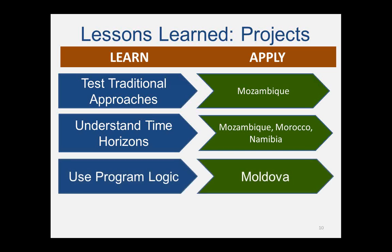Lesson number three: use the program logic. The case of Armenia showed us the importance of always going back to the program logic during implementation, especially in integrated projects that pair training with irrigation or rural roads. In Armenia, the irrigation infrastructure was delayed, but farmer training went ahead on schedule. This created a big gap right in the middle of the program logic — trained farmers didn't have reliable access to water, which was one of the major drivers of behavior change. At the same time, we continued with the evaluation, which began and ended before the irrigation was in place. In retrospect, we should have pressed pause and reconsidered the timing of both the training and data collection. That's exactly what we're doing now in Moldova — we've already rescheduled farmer training in response to anticipated infrastructure delays to keep activities aligned with the program logic.